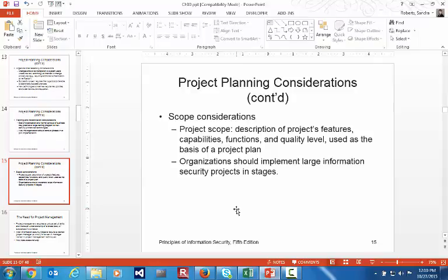The gap analysis is also called a negative feedback loop or cybernetic loop that ensures the process is measured periodically. If there's a big deviation, then you've got to do some evaluation and maybe make some corrections as you go through.